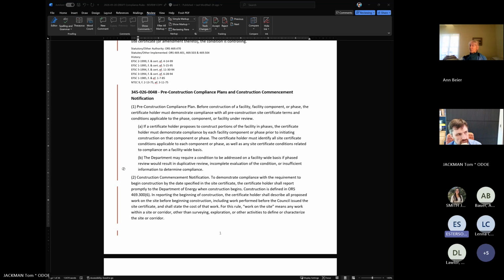It just means if you build the transmission line in the first 2 years and there was only half an acre of impact, or no impacts, but then your full 6,000 acres comes in year 3, well, then the HMP obligation doesn't hit until year 3. Now, again, if ODFW were to say, we really don't want any piecemealing, even if the impact is phased, then we can make sure that the phasing isn't allowed within the condition language.